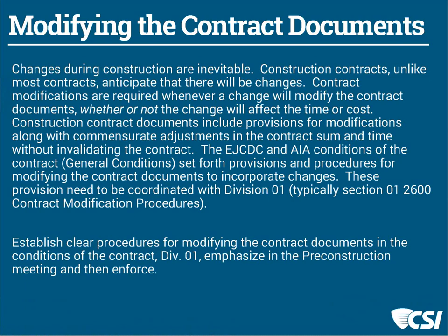We need to make the appropriate adjustments in the contract documents as we progress through the project. EJCDC documents and AIA documents specifically spell out how we do that. The most important thing is going back to your contract documents with your client and specifications — typically in Division 1 — that explain the process of modifying the contract, and sticking with that modification process precisely and exactly.